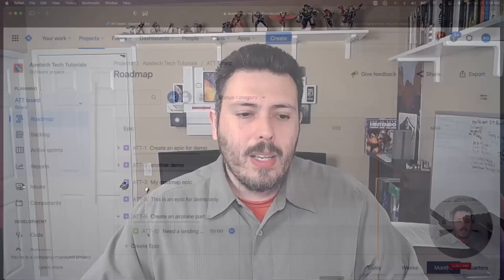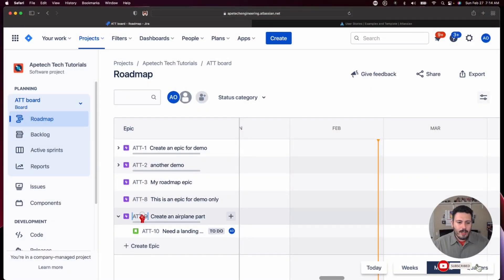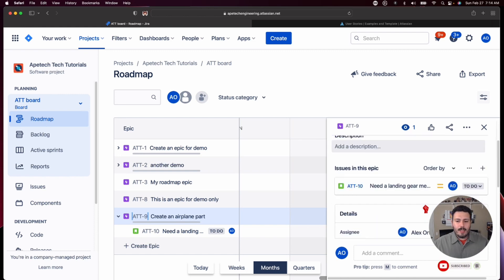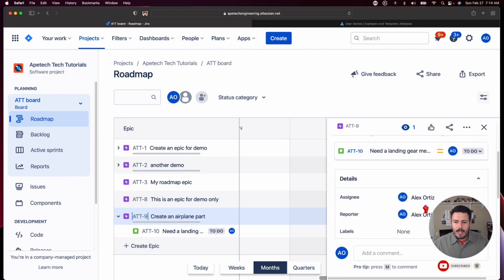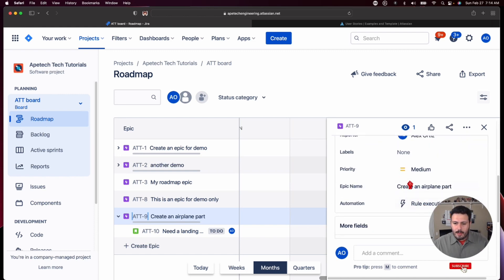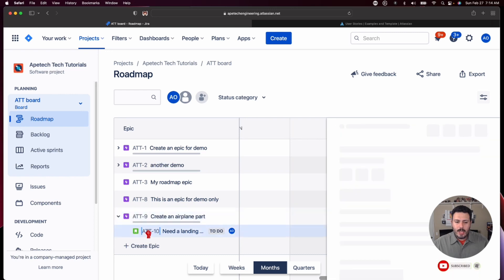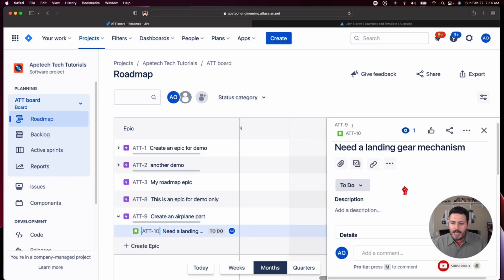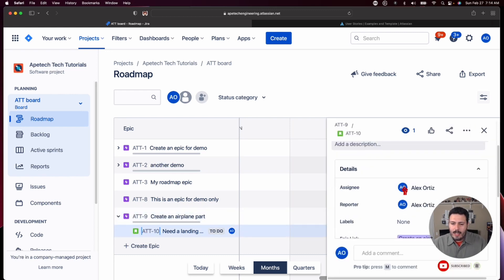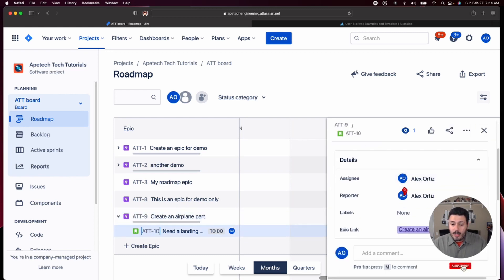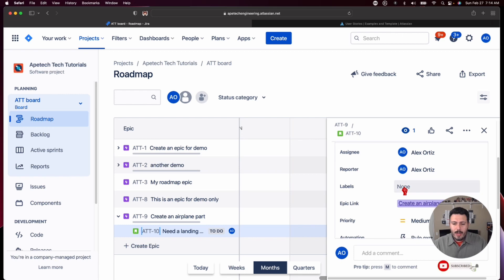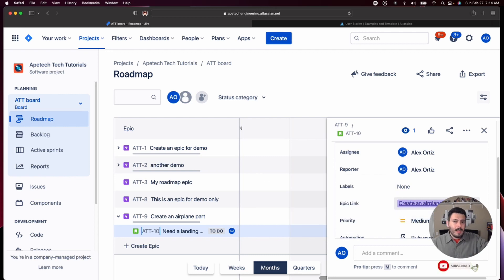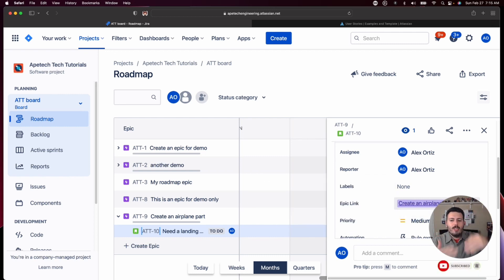Most importantly, let me show you what got created here. The epic name, if you remember from my video on epics, the epic name is defined here. If I go to the story, you will notice that the epic name is not there, but instead we have an epic link and this epic link is critical. This epic link is the epic name from the epic and those two fields create these relationships in JIRA. So now these two issues are associated.